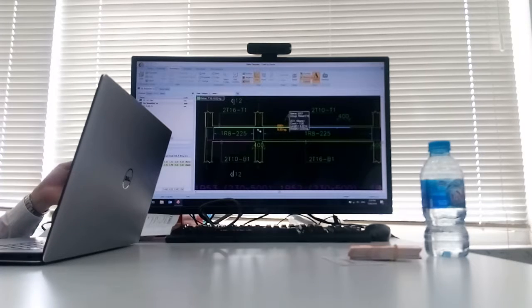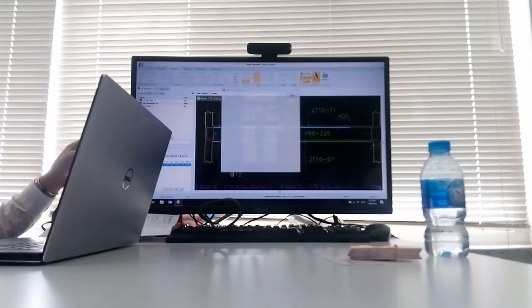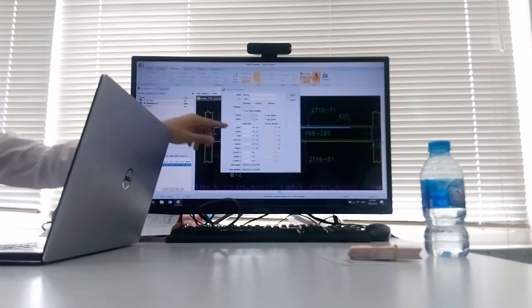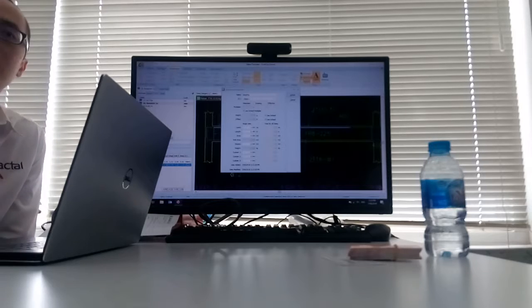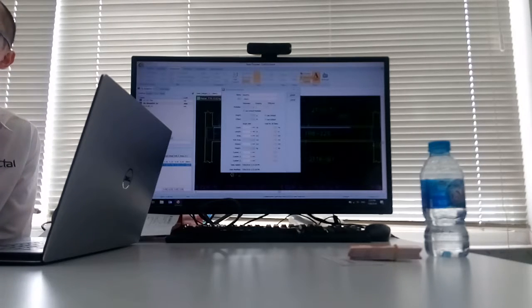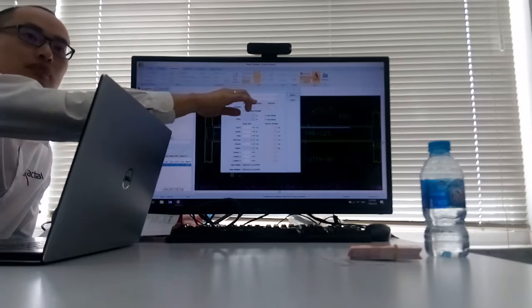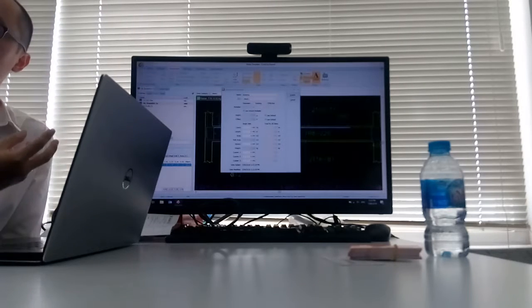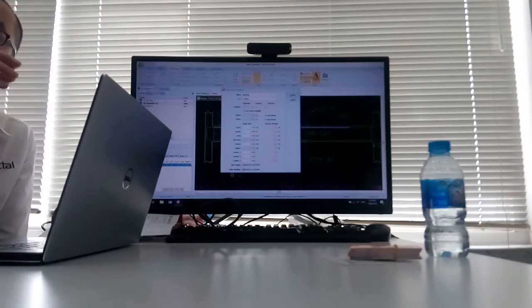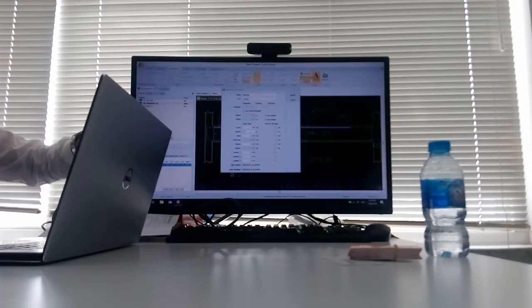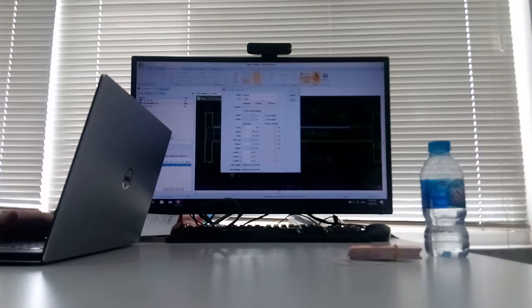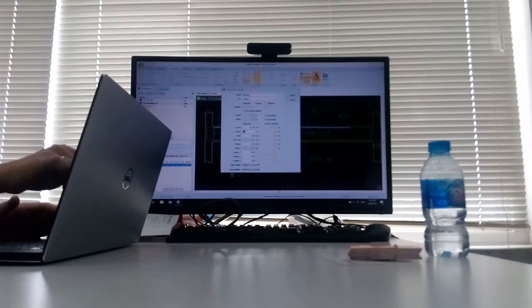You create every single item separately so that when you want to check, it is easier. Even though you have the option to input everything inside one, once you know how many Ds plus everything, you can multiply and put it inside, but it will make it difficult to check in the future. So whether this is lapping or hooks, you can name it yourself so that you can keep track in the future of what the multiplication is. If, as you mentioned just now, it's 40 Ds, then I don't use this length; you adjust the count over here, okay, it's 40 times, then the D, and you just put in the diameter, but the figure will be very small.